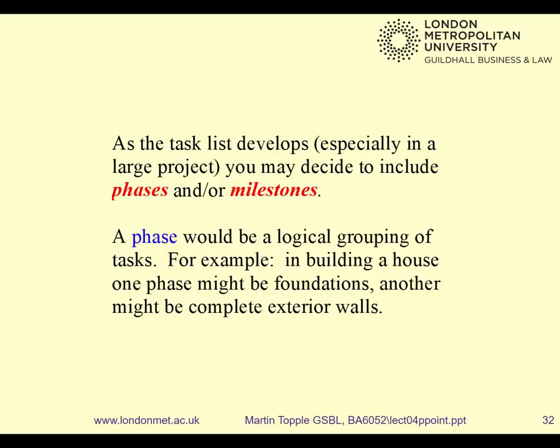Now, a phase would be a logical grouping of tasks, and you might group them for a number of reasons. In building our house, one phase would be the foundations, another one would be the walls and the roof. They would all be different phases, and each phase would consist of a number of connected logical tasks. Or you might group it in a phase, because that phase is all those tasks that involve certain people who are managed by this person. So there can be different reasons why you might group tasks into phases. But it's your discretion as to how you would break your project down into phases, sort of super tasks that consist of tasks underneath them.